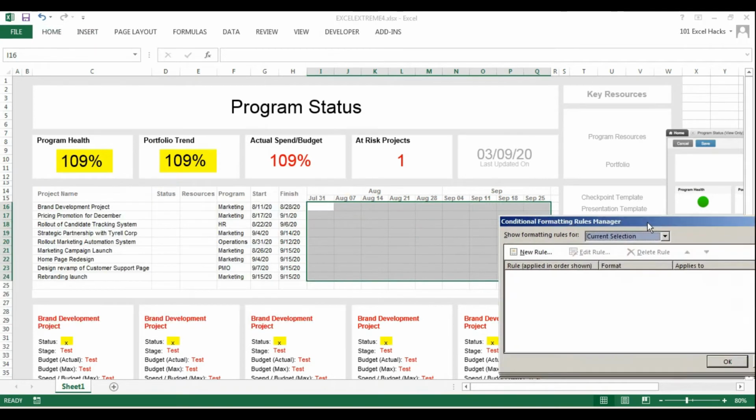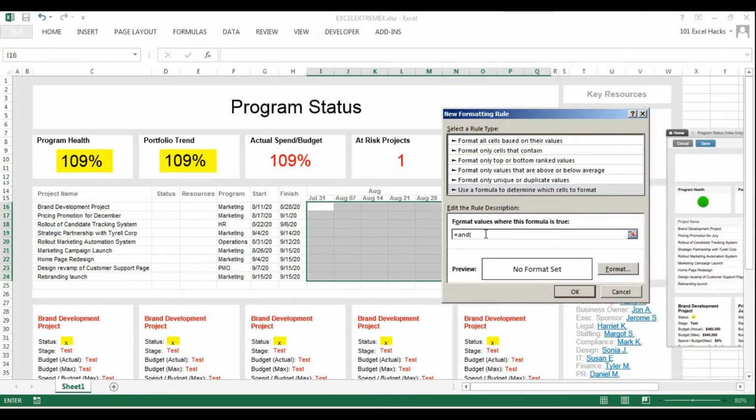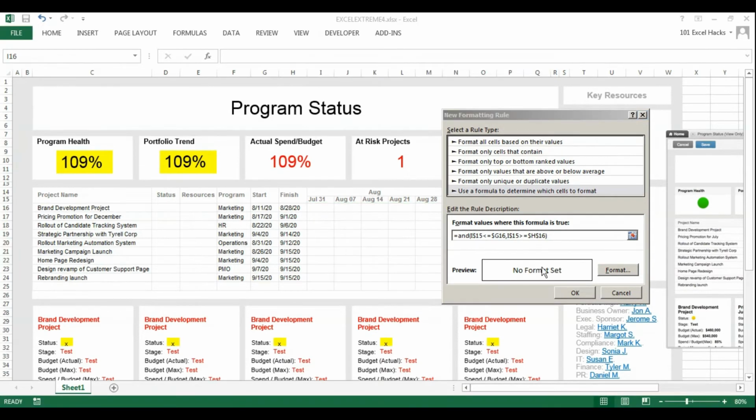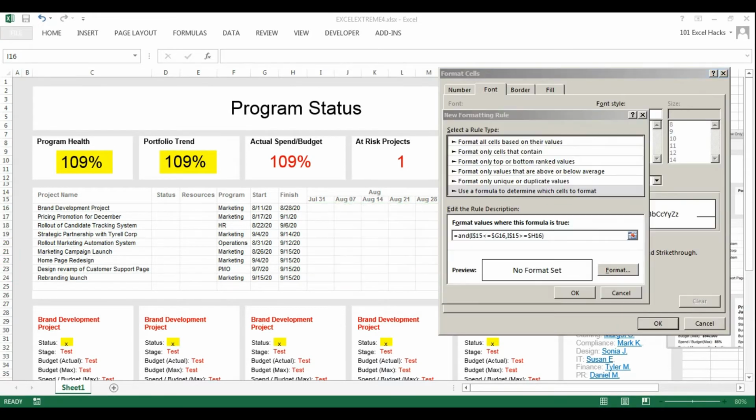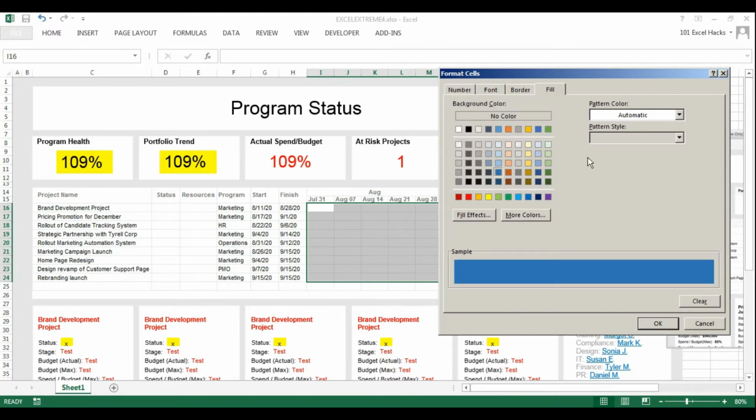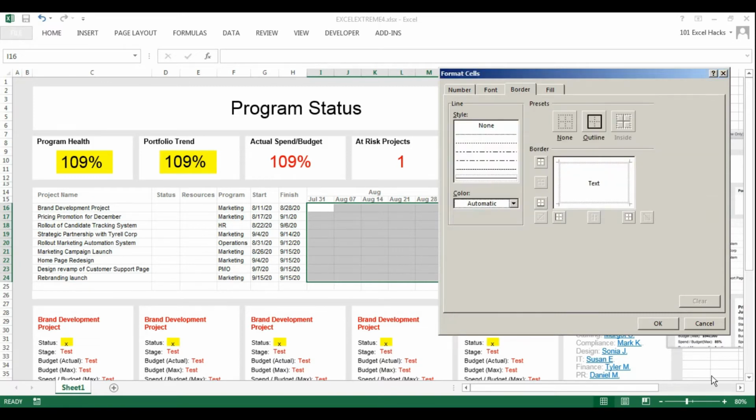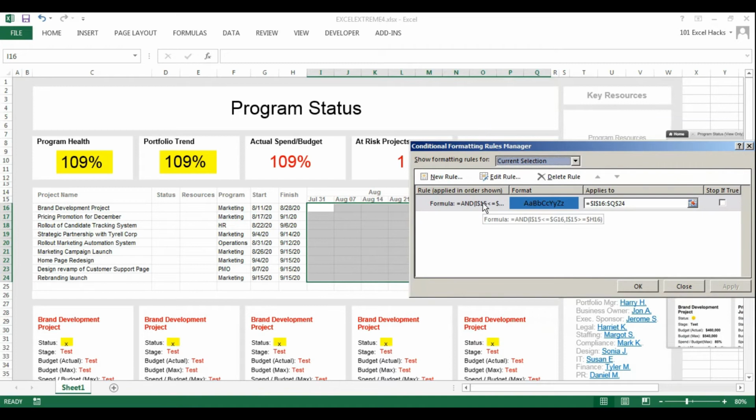Over to the Gantt chart, which is where the font starts. I'm going to create an automated Gantt chart that automatically colors out the cells that represent the project duration, which is the time between the start and the end date, by creating a conditional formula which checks for when the date above is equal to or greater than the start date and equal to or less than the finish date. And I've set that up and you can see that it works.